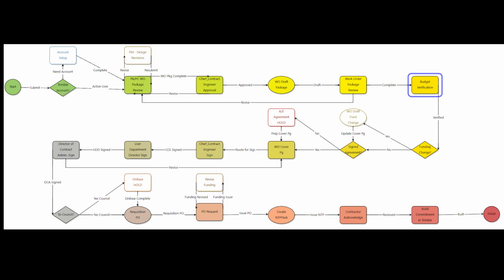Once Ani is acceptable of the documentation, it will be sent to the user department's budget analyst for verification of funding. This is important because a project cannot be implemented without appropriate funding. The funding does not necessarily have to be encumbered at the time of this process, but once the notice to proceed is issued, it is important that the funding information is correct.